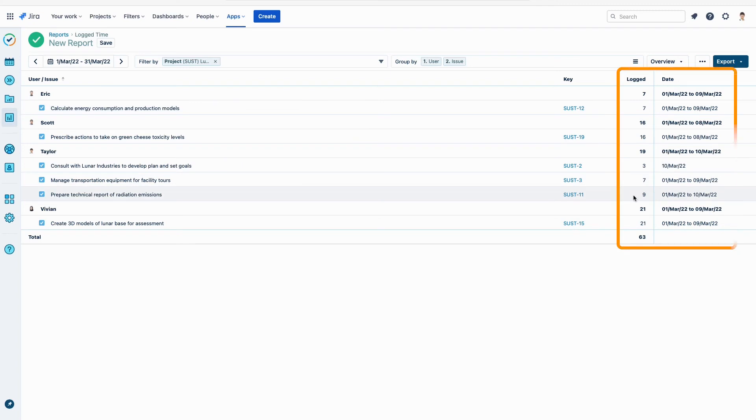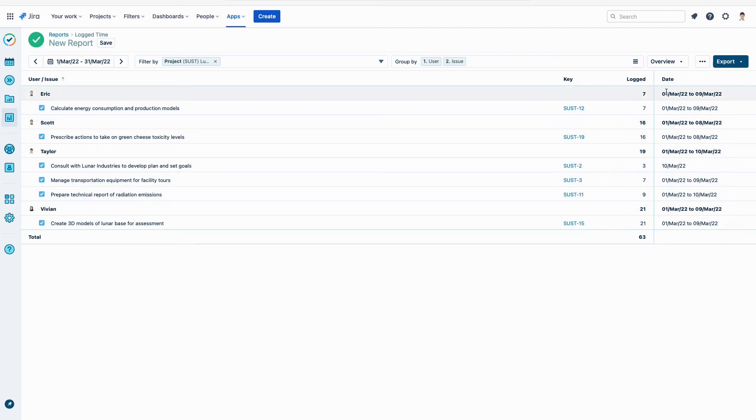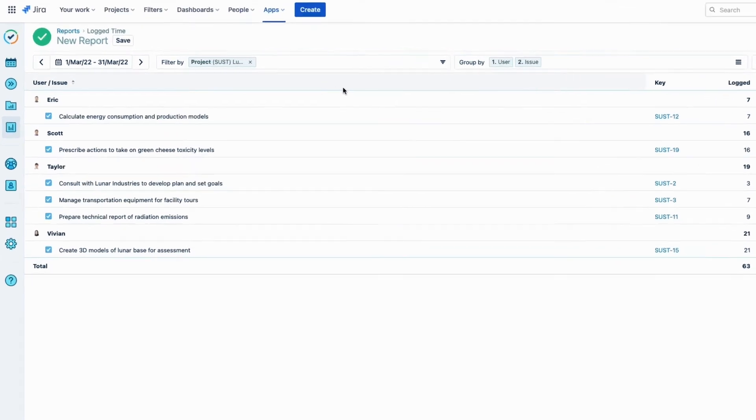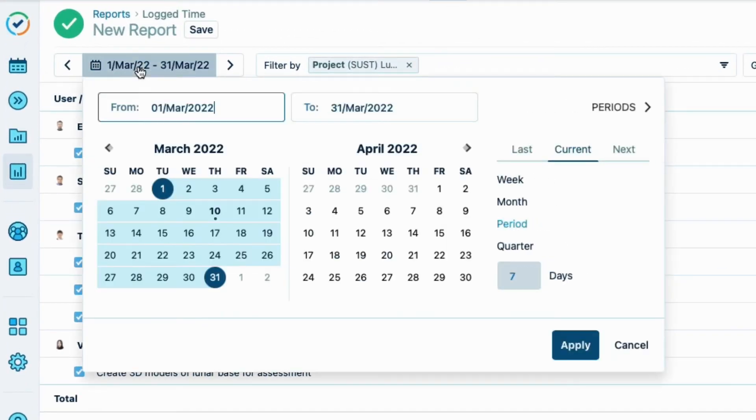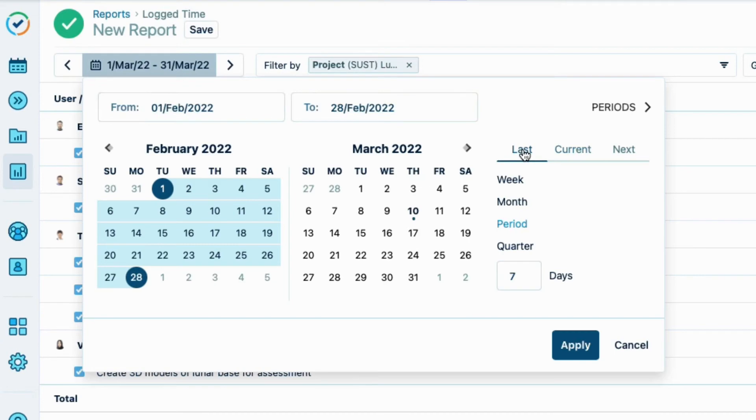The logged hours are displayed for the current month, but the work that I want for the report was done last month. So I just click the date picker up here to open the calendar, and then click Last, and Month. This creates a dynamic period report where the date shown is always for the last month relative to the current date. I click Apply.